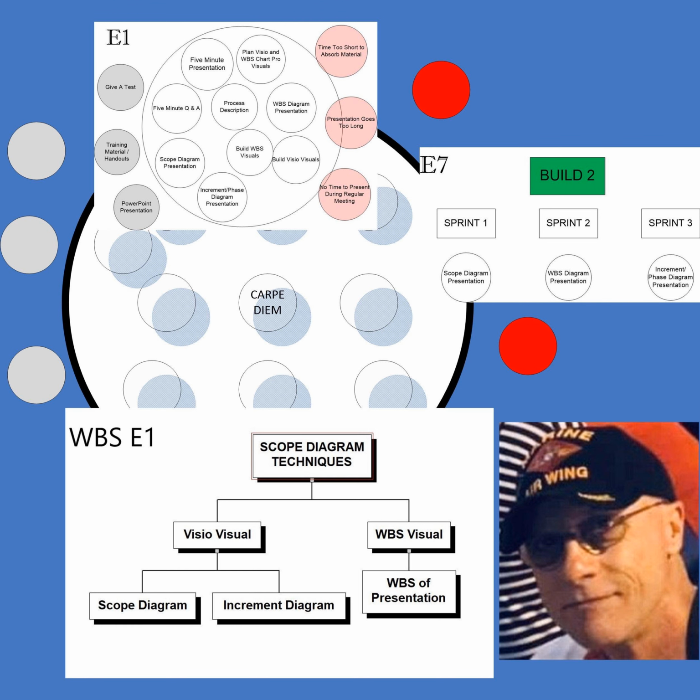Sometimes I add another column as a reference, showing what we're referring to, whether it's a memo, a law, a federal regulation if it's an agency, or a contract with a customer if it's commercial. And sometimes I also add another column to show who's responsible for that. So once you have that scope diagram done, with everything in scope and everything out of scope, and, as I showed you on some of them, the risks already there, you define them all in the list. Everybody agrees on that, and the risks you still leave there until after you do the WBS. Then you start on the WBS.